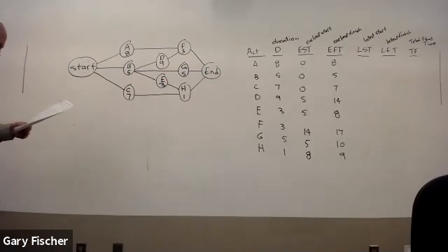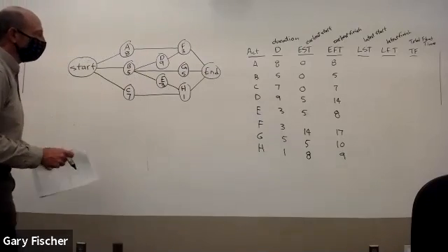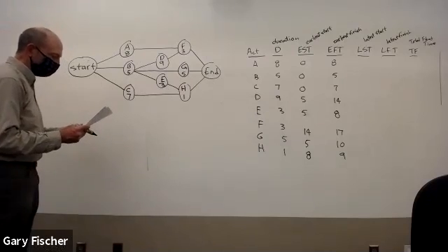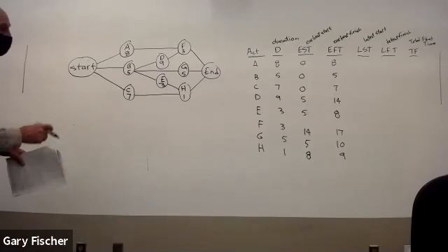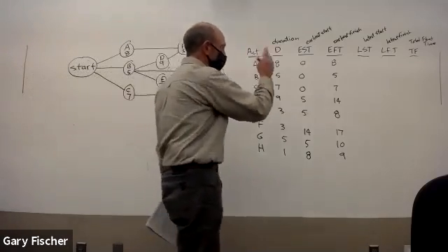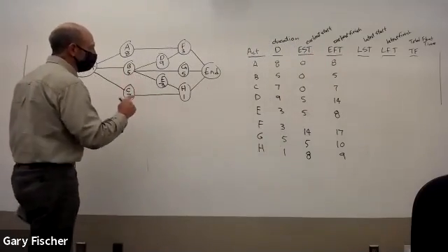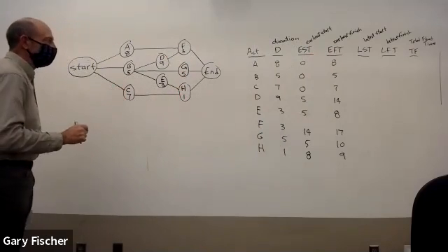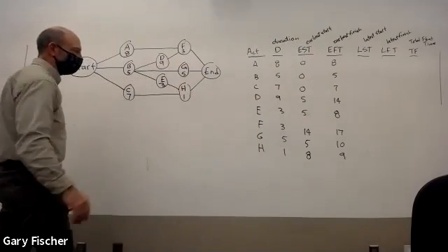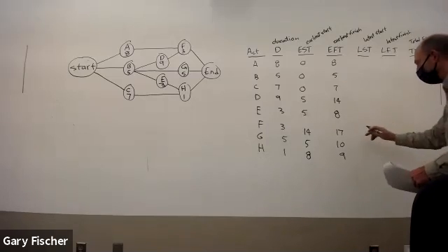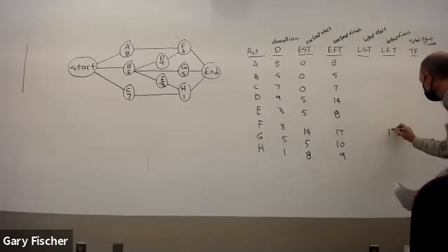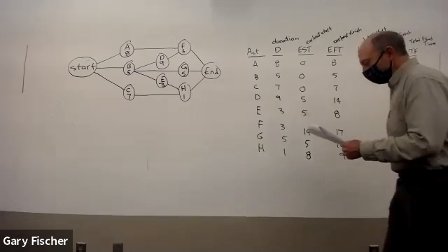And let's see here. How do they determine and which ones get? Oh, okay. That would then apply to, let's see here. Is the minimum latest start time in the activities that follow or that are following it. So the latest finish time for all of these activities at the end are the same because there's nothing that follows it. So they write in here that the latest finish time for these last 3, F, G, and H, is 17 days.